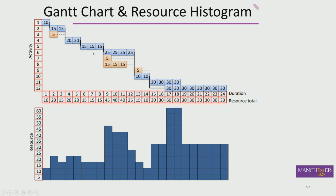So this particular so-called Gantt chart or project plan is using different amounts of resource, let's say the same type of resource as well. Let's say it's all assembly or machining or even all design work. If you're a design authority, then you could be using lots of designers all at once, because that's how you plan the project. So you need to smooth that resource. And that's to try and mitigate the risk of something happening.